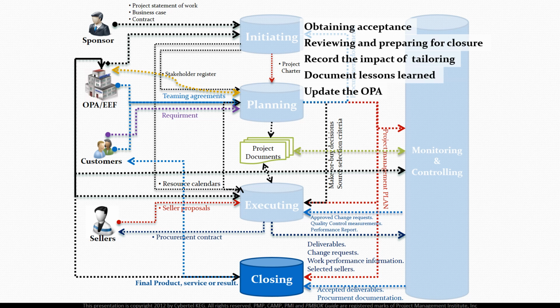The effort in this process group also includes archiving of all project documents, usually in the Project Management Information System (PMIS), to be used as historical data. This is a third-party project management software like Microsoft Project or SAP, etc. Also, we have to close all procurement contracts we made during the project with all relevant agreements, ensuring soft closing with sellers and partners.